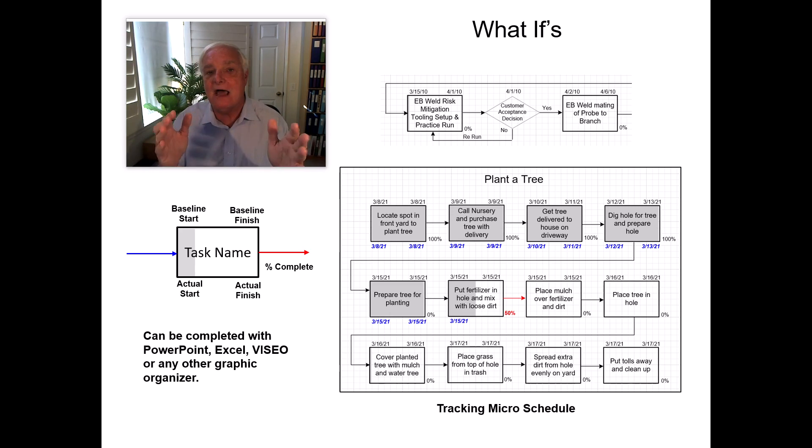The blue dates underneath are the actual start and finish dates. So remember the top is the baseline start and finish date and then progressively as you're filling the chart in, you get a good sense of if you're on track, on schedule, and we call this micro-scheduling.